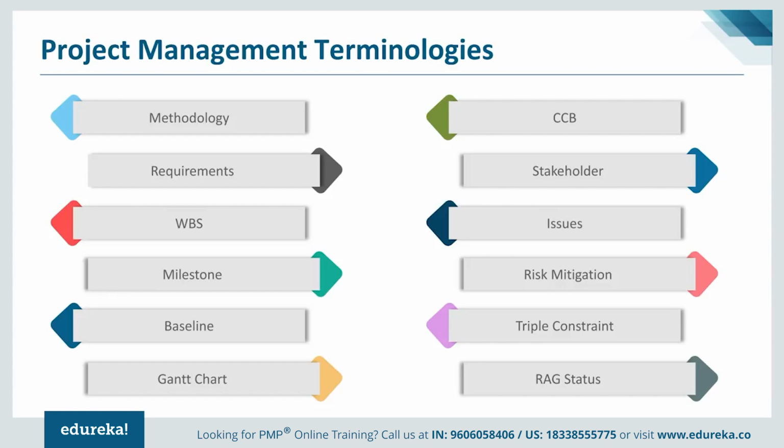All the stakeholders come together and ascertain, if we implement this change at that stage, what the impact of that change will be on the schedule of the project, the budget, the overall risk, whether risk will go up, resources, etc. Once they understand the impact of that change, they decide whether to approve or reject it. So the change control board is where the fate of the change is decided, in a way.